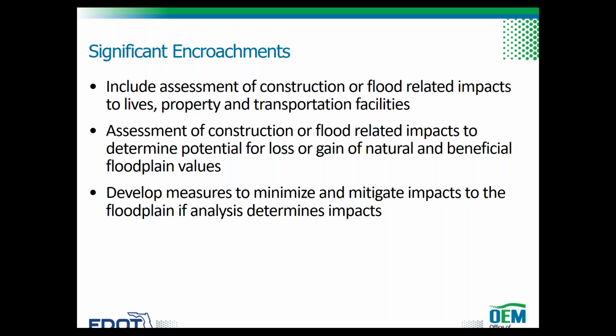The following floodplain values should be included in the assessment: natural moderation of floods, water quality maintenance, groundwater recharge, fish and wildlife habitat, plants, open space and natural beauty, recreation, agriculture, aquaculture, and forestry. If floodplain analysis determines that the impacts to lives, property, and floodplain values cannot be avoided, the district must develop measures to minimize and mitigate the impacts.